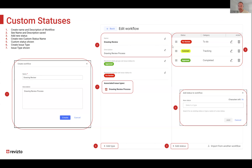These categories are relevant for backward compatibility. If somebody is still on 5.13 and custom statuses have been deployed: anything in the to-do category will show as open, anything in the tracking category will go to in progress, and anything completed will go to closed. So just be aware of that if your projects haven't been fully upgraded.